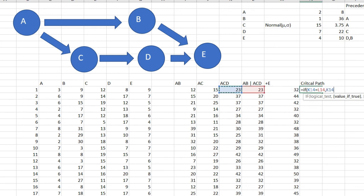Then ACD—or I can write the whole path including E. This is a simple example so it works: ACDE. Otherwise the critical path is ABE. Double-click and I have it for 10,000 projects.